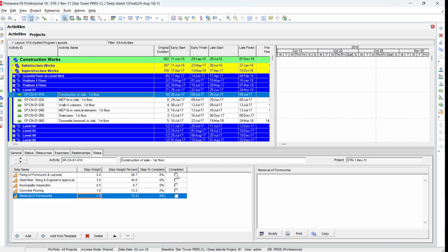If the intention is not to add more activities to the program, to retain its simplicity for better understanding by our client, because it is normally observed that higher management are not looking for such details, but the engineers and the people working directly on site want to see the status of these activities too. So to maintain the simplicity of our project while handling the complexity of the activity, instead of adding additional activities, we can make use of the activity steps.